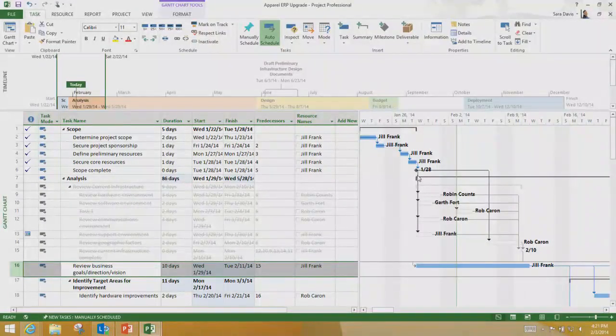Oh, so I see your question. Okay. So this milestone is basically what all these tasks are connected to, right? This milestone right here. And basically what we do when you inactivate it is we look at the last active task, and that is this one. Because these tasks are all starting here, this one jumps back there, and this one is essentially now being driven by that milestone. Okay, but task 16, when you double click on it, it's showing task 15 as the predecessor. Yeah, we don't update the predecessor links. We just update the drawing.